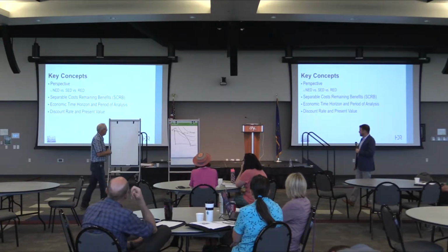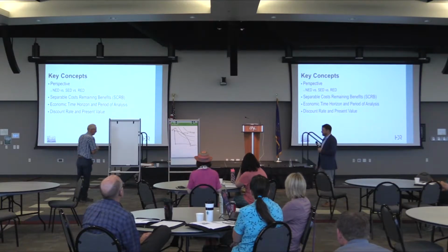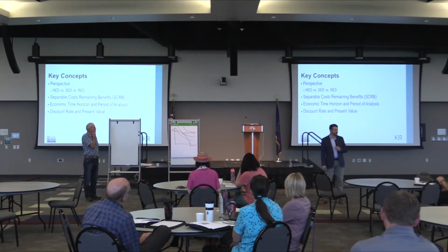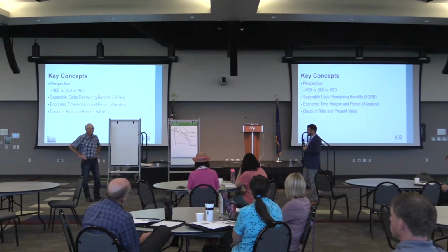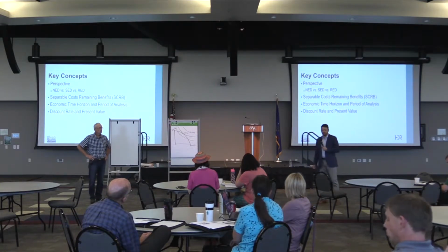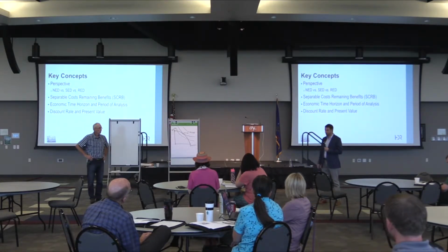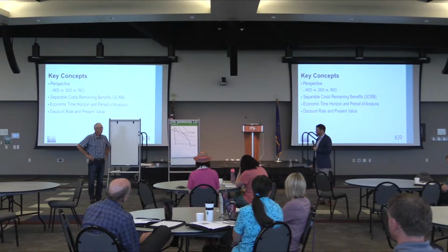Economic time horizon and period of analysis. So period of analysis is the time over which benefits and all costs that we're looking at accrue for the project. In this case, we're looking at 50 years. 50 years is the generally accepted time horizon for water resource projects. You don't want to go beyond that because, as Jay mentioned this morning, 500 years, we don't know what's going to happen in the future. There's things like adaptive management that would change the way local communities deal with flooding. So in this case, we limit that to 50 years, which is a reasonable time horizon for the life of a project.